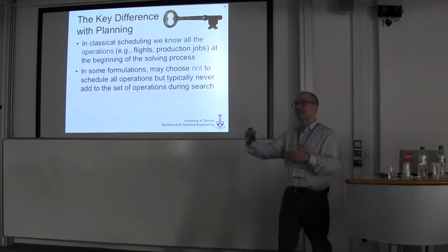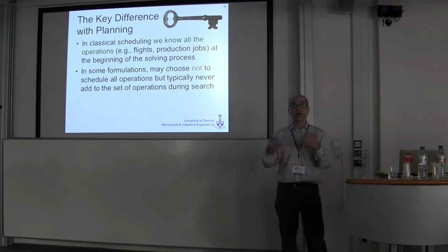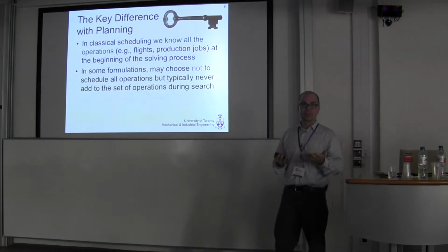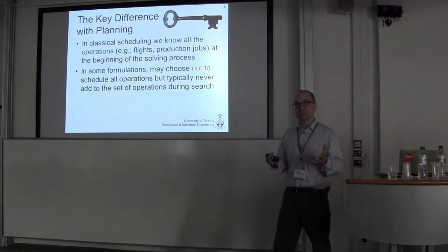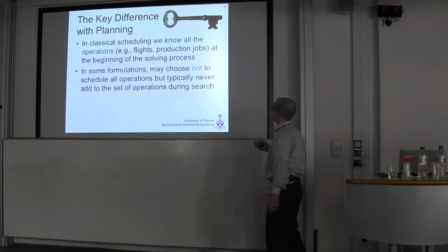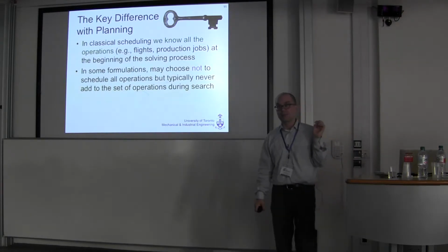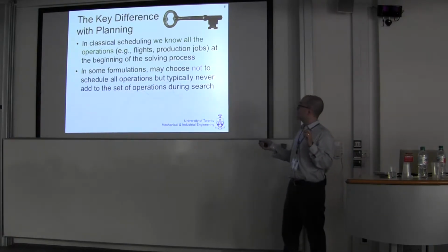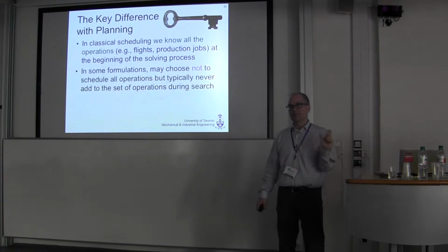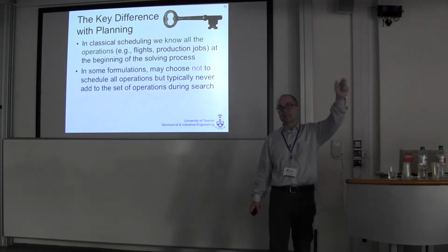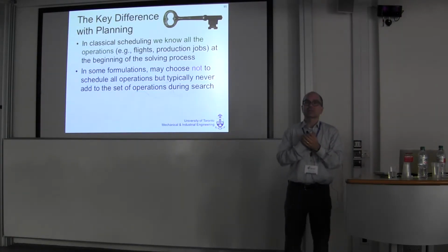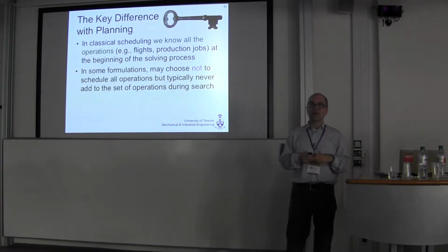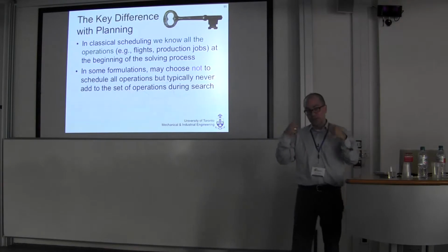Whereas in planning, obviously, we're instantiating the operators to figure out what are the actions that are going to have to take us from our initial state to our goal state. You can think about the planning problem as having been done for us. We have a set of these operations that we need to schedule. In some formulations, we may choose not to schedule all the operations. So we might have optional operations. But typically, in our problem, we are never going to have a decision that will add a new activity. Okay, we might be able to decide some activities are going to be ignored, but we're not going to add them in the classical, in general scheduling problems. It would be very strange to have new activities arriving based on our sequencing, based on our search decisions.